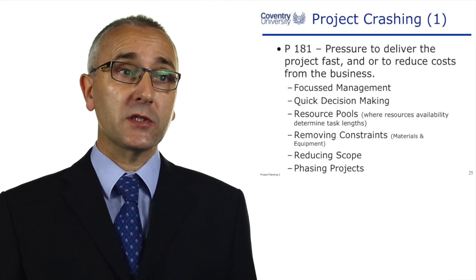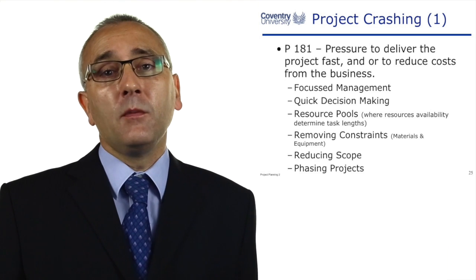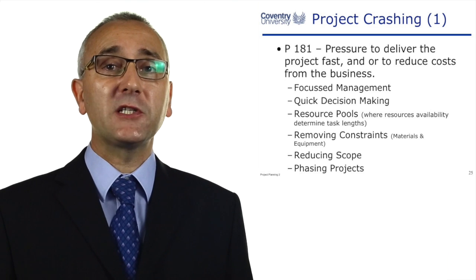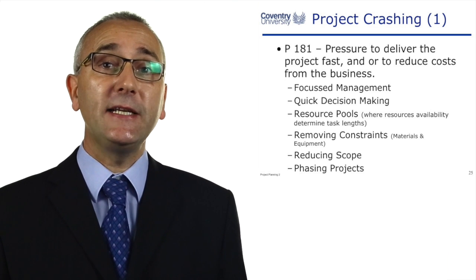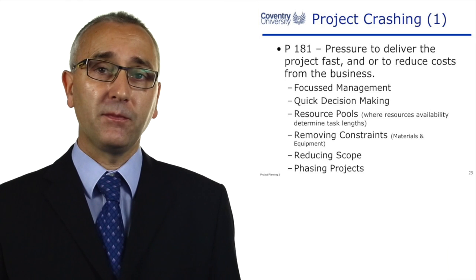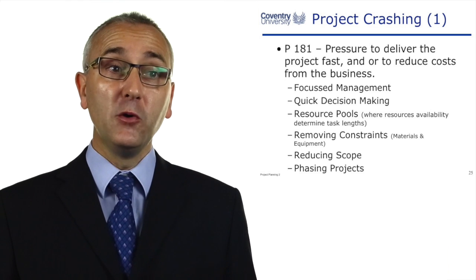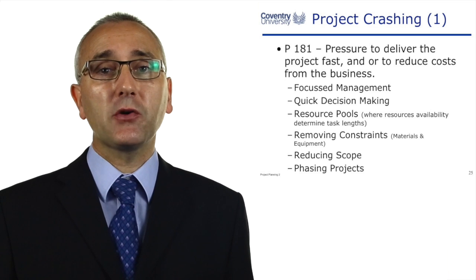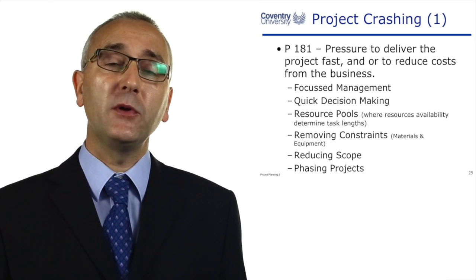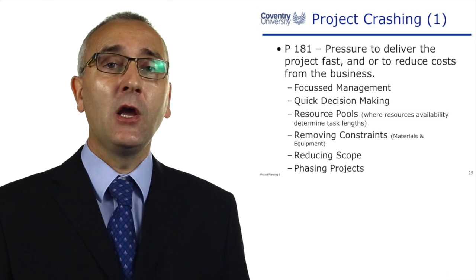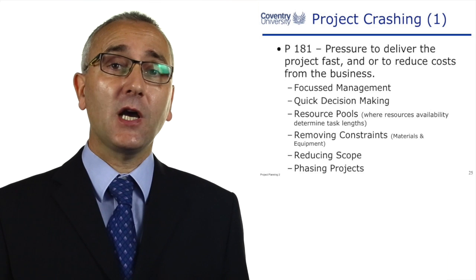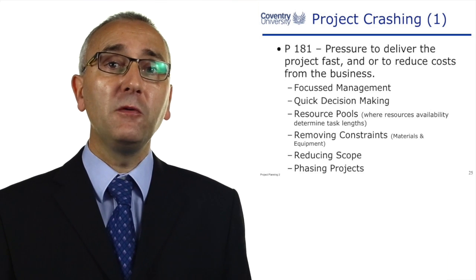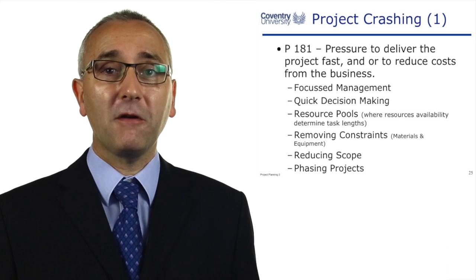Use resource pools, or look at pooling up your resources such that you can move your resources easily to the tasks that need to be reduced in duration. Try and remove the constraints — you may find you're constrained by particular pieces of equipment, particular resources, or the sequence of tasks. Try and remove these constraints so you can move things around and your plan becomes more flexible.